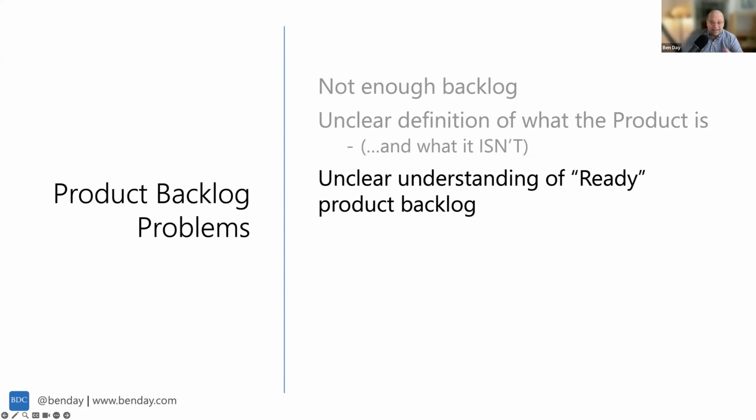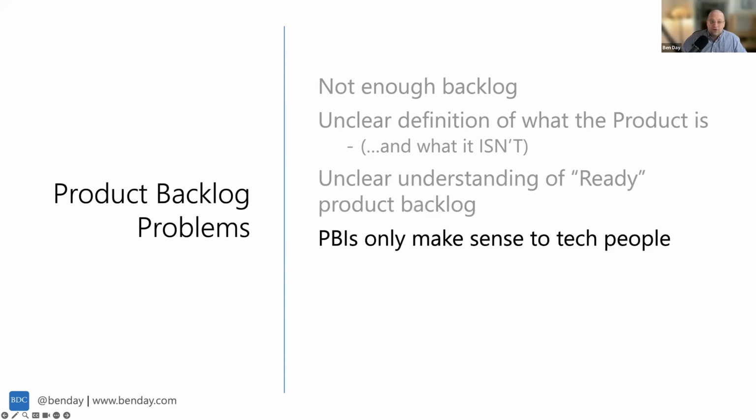You want to have 2 to 4 sprints worth of known product backlog. It doesn't have to be perfect. The priorities might change, but 2 to 4 sprints is a lot of stuff. And it starts to give you something to communicate with your stakeholders about. You can show what your priorities are, and you can start asking and answering questions about what those priorities are and what their priorities are.